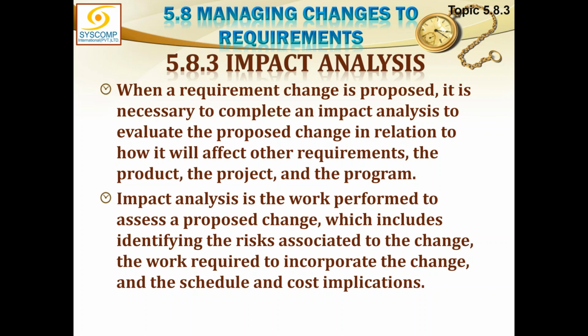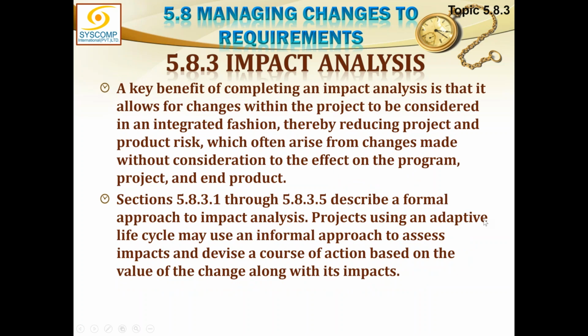Impact analysis is work performed to assess a proposed change, which includes identifying the risks associated to the change, the work required to incorporate the change, and the schedule and cost implications. A key benefit of completing the impact analysis is that it allows for changes within the project to be considered in an integrated fashion, thereby reducing project and product risk, which often arises from changes made without consideration to the effect on the program, project, and end product.